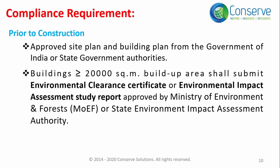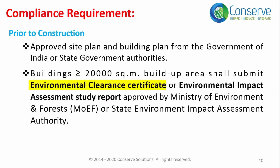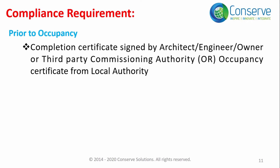For larger projects with built-up area greater than or equal to 20,000 square meters, the project should have an approved environmental impact assessment report or environmental clearance certificate as per the guidelines of the Ministry of Environment and Forest or the relevant state environmental authority. Prior to occupancy, the project should get a completion certificate signed by the architect, owner, or third-party commissioning authority, or a fit-to-occupy certificate from the relevant local authority.